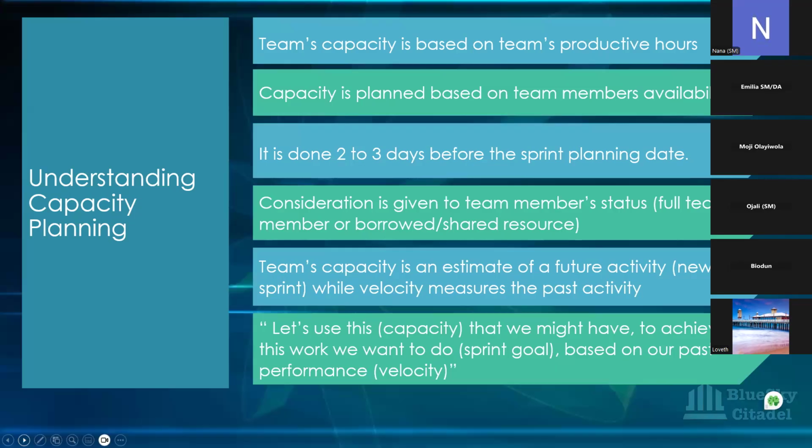So you want to meet with that person, know the percentage of their time that is going to be focused on your team's work, and factor that into what you're doing. It helps you to know that, okay, on the data side of things, we need to do some data migration, or some data loading, and this person can only work with us for a few hours a day.